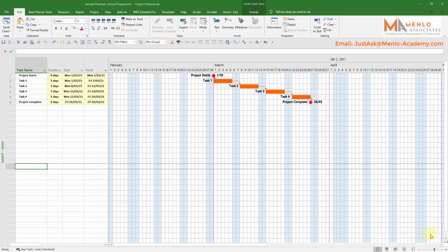When you write a program for a project, that becomes the roadmap for how you expect the building to be built. You work out how long you think each task is going to take and where in the network of jobs that have to be done each stage or each step appears. Now, at the time you start the contract, that becomes the master plan that you measure everything against, and you have to regularly update the program and report on progress against your planned methodology. Now that creates two issues.